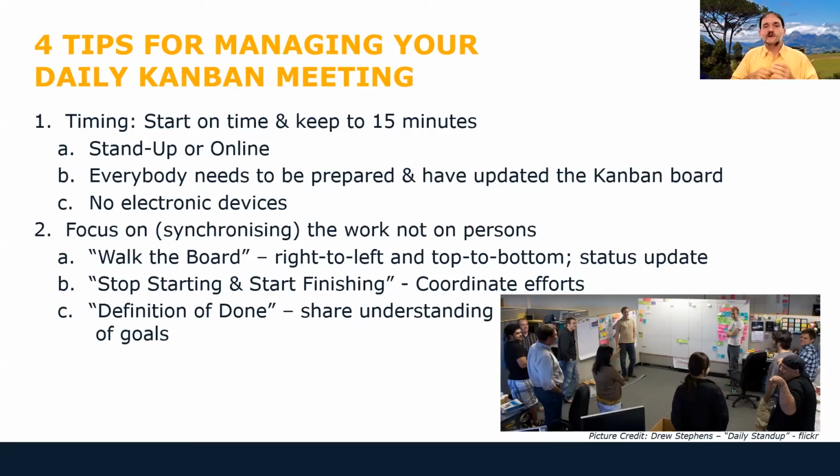And the same thing we are going to do with our definition of done. We need to also be clear. What does it mean to be done? Because when we started, we might have made a definition, but we might not be very clear. And things are often hanging at 80% or so because we weren't that clear to say what it means to be done.